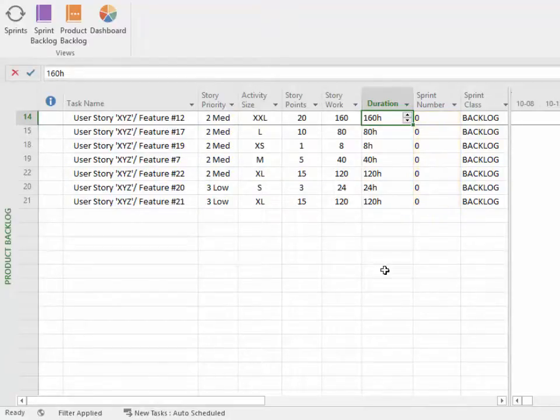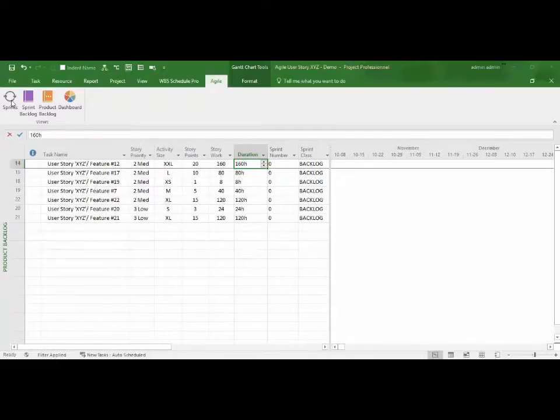It should be noted that just because a feature or user story is assigned to a sprint or iteration, it's still in the product backlog. The product backlog represents the entire vision of the product. That is, the status of the feature or user story will change by showing it assigned and committed to a sprint or iteration. So perhaps I've taken some liberties here in this demonstration, but the message is clear. PPM is flexible enough that it can definitely accommodate any nuances that may exist and be adjusted accordingly.